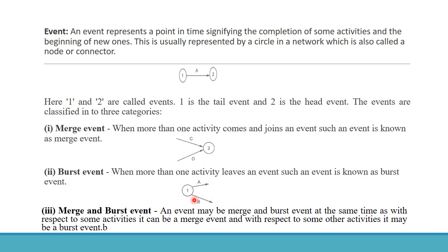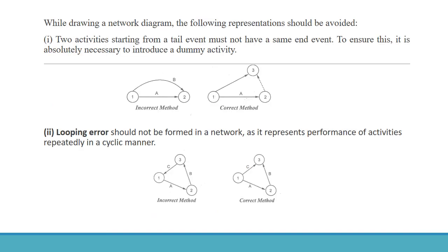The merge and burst event: an event may be merge and burst at the same time. With respect to some activities it can be a merge event, and with respect to some other activities it may be a burst event. So while drawing the diagram, the following representations should be avoided. So we have to draw the diagram by using network activity.